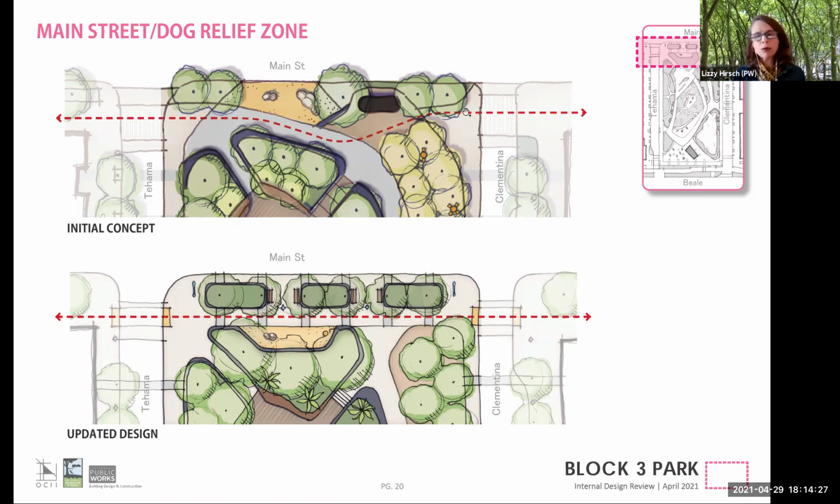So we don't have any formal way to incorporate a prefabricated restroom on the right of way, which was the preferred decision in the community. And then secondly, you can see this pathway has changed. It was once a meandering pathway. But as we study this with our disability access coordinator, you have to consider people that are blind, wheelchairs. So there is a regulation that this actually has to be a straight shot between block to block.